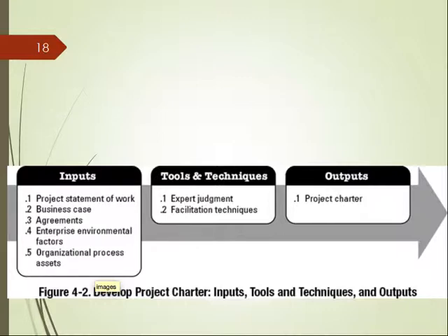But if we ship a product with 20 defects for the 10,000 lines of code, then customers did not like it and reject the product. So based on some historical information we can do the planning. Okay, so these organizational process assets will be those historical information.